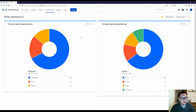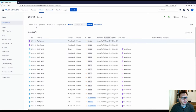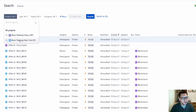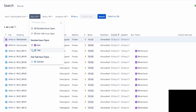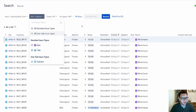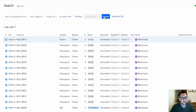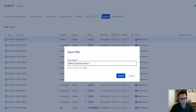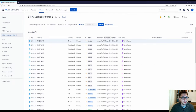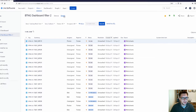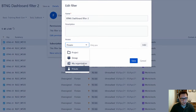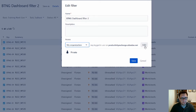I don't want the epics returned. The way I've set the filter up at the moment, it takes all of the issues inside a project, including the epics. There is a way to get around this — use filters. Go to Filters, then Advanced Issue Search. I'll create a search that shows all items in the Next Gen project, then filter it to show just tasks and subtasks, not the epics. Click Search, then Save As, and I'll call this BTNG Dashboard Filter Two. To make sure other people can see the filter results on the dashboard, I need to share this filter with them — so click Details, Edit Permissions, select the permission group, click Add, and click Save.